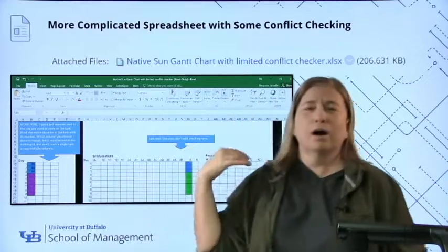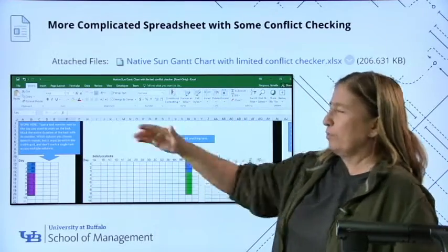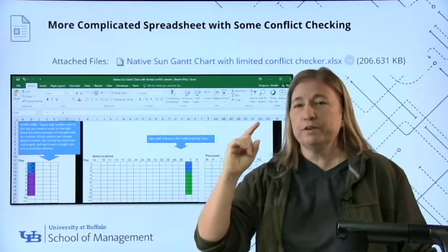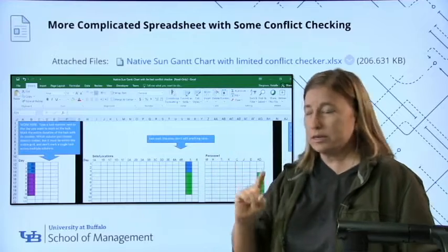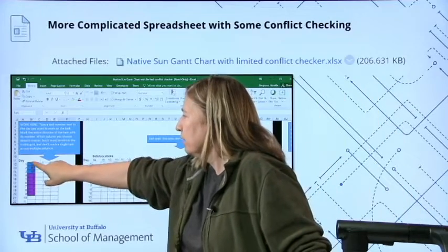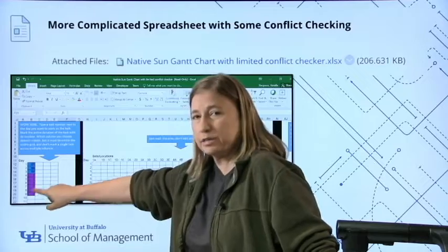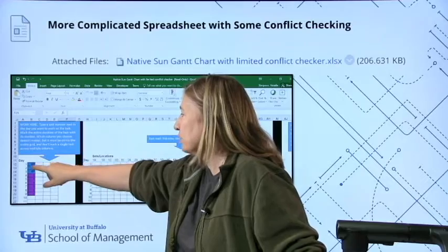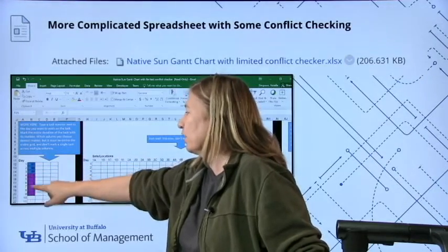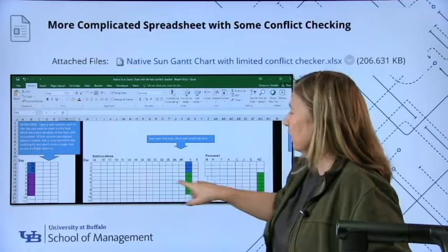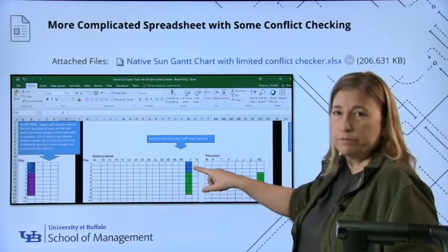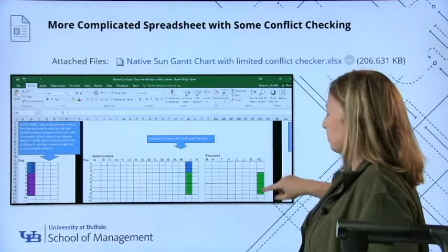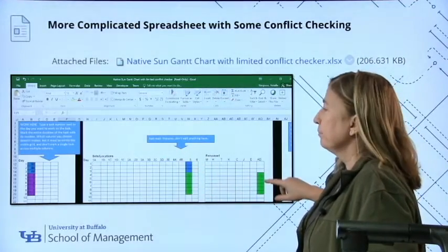Oh, you remember, like, I'm Robert Altman. I want to prep that location 5 right away, task 68, and film the first scene in the plot, the opening of the story. That's task 1. You enter the days that you want to be working on particular tasks here. And it doesn't even matter which column you enter them in. So I entered 68, 68, 68, and then I entered a couple ones, meaning filming. Enter it here, and you'll notice what happens is it marks it for you. It marks it for you under the locations, and it marks it for you. There's the assistant director right there.